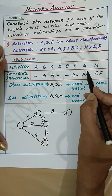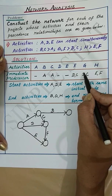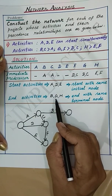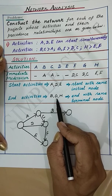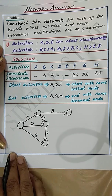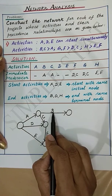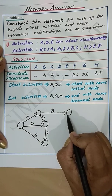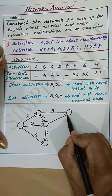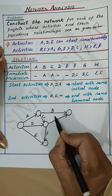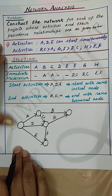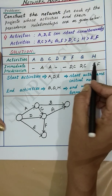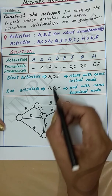Now activity G. Activity G also occurs after C and D, and we know that G is one of the end activities. Activity G should end where activity B ends — it starts after C and D end. This is activity G.